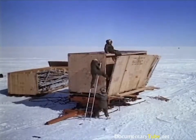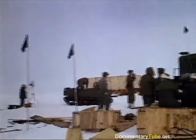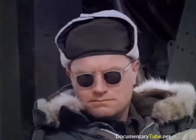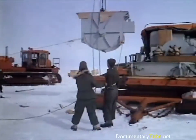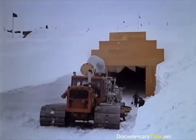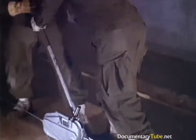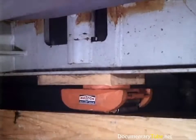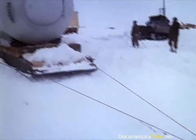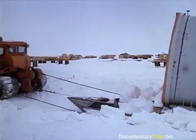Boxes of piping and wiring, each item carefully labeled, were opened so that each unit would be available when needed. Major components shipped in pieces because of weight limitations were reassembled before being moved into the trenches. The condenser, 15 tons of steel, was one of the first units to be moved into the tunnel prepared to house it. When the condenser was slowly winched forward, small tracked rollers supported its entire weight.